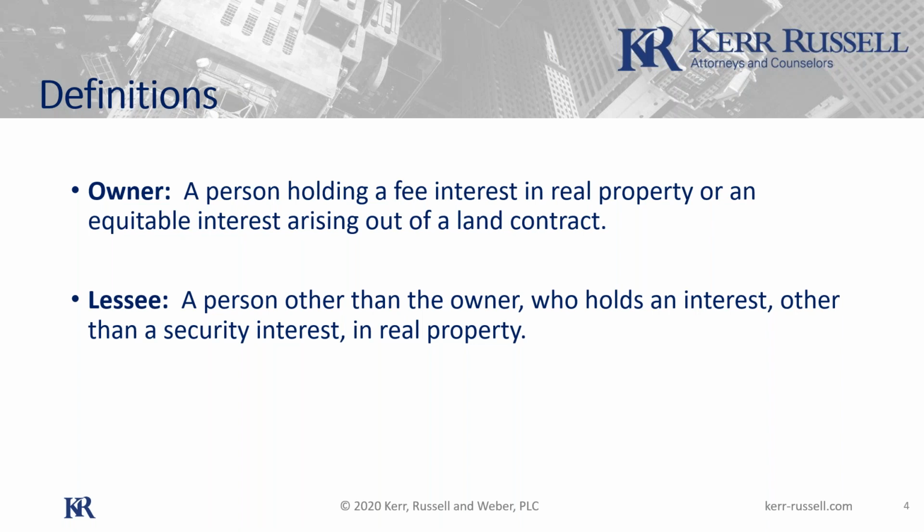That is yet another different legislative angle that has been provided to you people to collect on a debt. And under the case law, under that statute, it actually allows you to go after individuals at the customer who made the decision about paying persons other than yourself. The Trust Fund Act says that a contractor who receives funds from an owner must first use that to pay subcontractors and suppliers before anyone else. And as I mentioned, the case law actually allows you to reach the decision maker who holds the checkbook at the customer, to potentially claim against him or her if they failed to pay the downstream vendors like they're supposed to. So that's actually a third different angle that you folks have available to you.